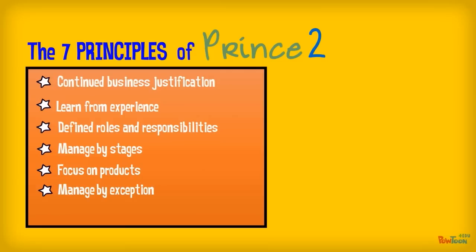Manage by exception. Senior managers shouldn't be bothered all the time. To know when to escalate, you define ranges. What comes out of these ranges is an exception and should be then escalated.